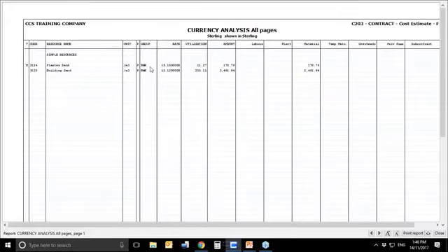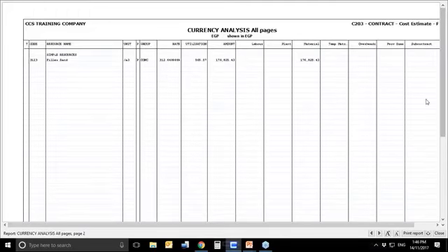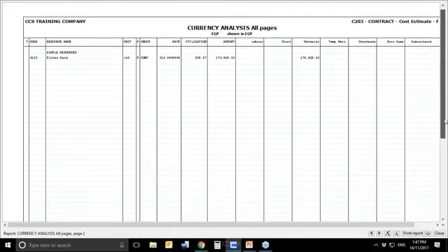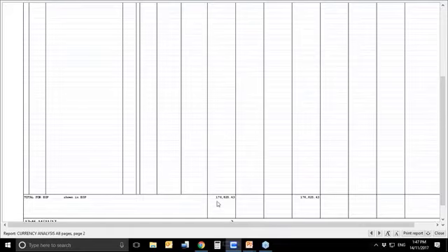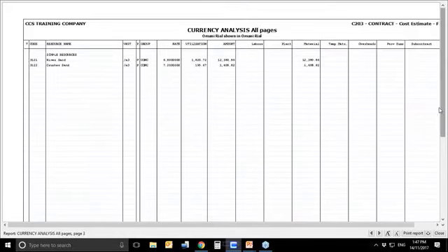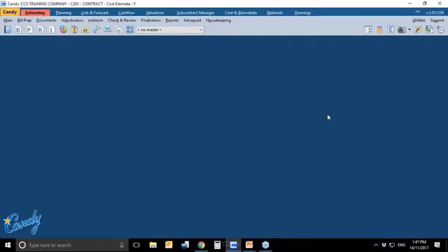So it tells you about the plaza sign and building sign that you're buying in pounds sterling. If I come down, have a look at the report. It tells me on this project you need to account for 2,632.6 pounds sterling. If I go to the next page, it shows me that I'll be buying a pillar sign in Egyptian pounds. And how much Egyptian pounds do I need? I need to account for 176,000 Egyptian pounds. The next page shows me the Omani Riyal requirement on this project as well. And so on. That's the currency analysis report for you, which is a standard report.